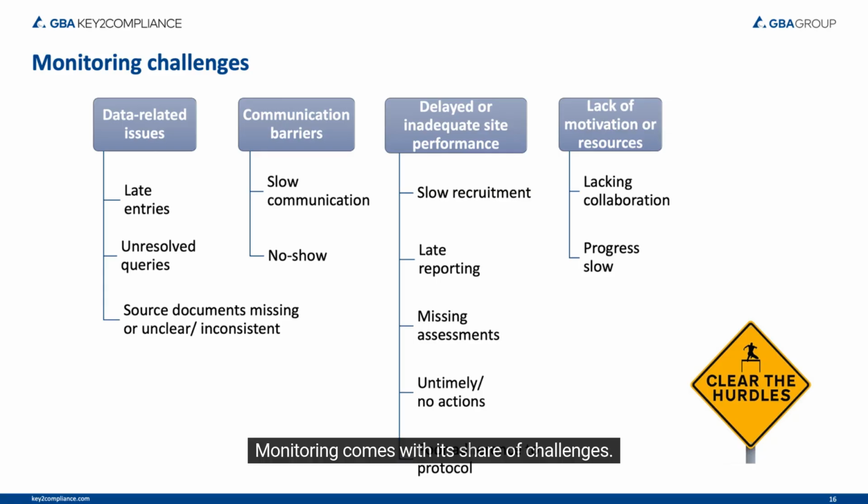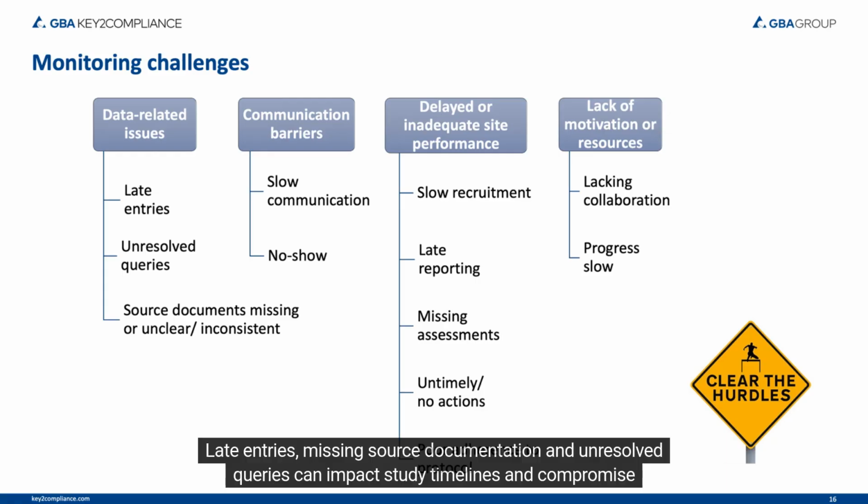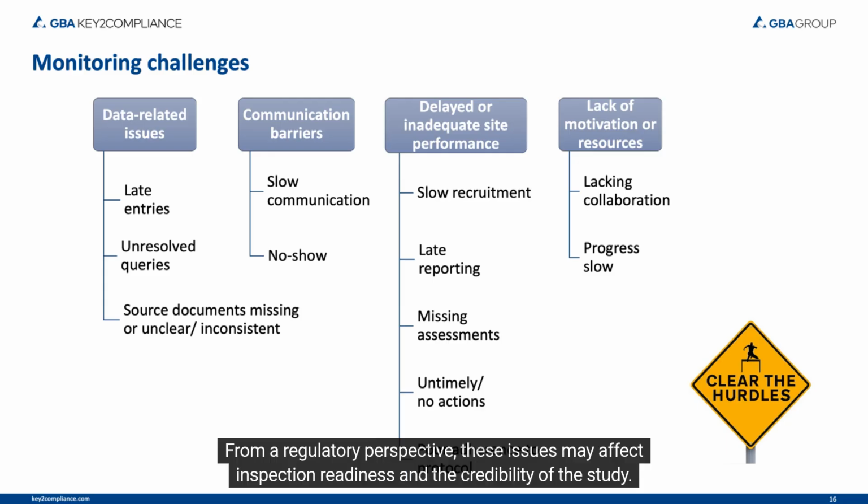Monitoring comes with its share of challenges. Data-related delays are also common. Late entries, missing source documentation, and unresolved queries can impact study timelines and compromise data integrity. From a regulatory perspective, these issues may affect inspection readiness and the credibility of the study.